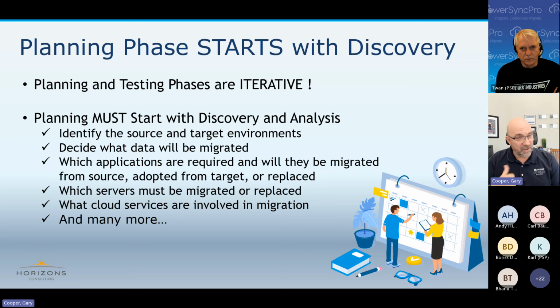So I was on a phone call this morning where we were moving user objects. We validated the application set 3 different times. We were told that the application, being a Linux-based application, wasn't sensitive to the DN of the user, meaning the path, the organizational unit that user was in, was not important to that application. We moved a few dozen users over a few weeks to test, no problems. We moved the first 495 users, major problems, we need to roll it back. And we're like, well, wait a minute. So those sorts of things need to be understood, and that starts with the discovery.